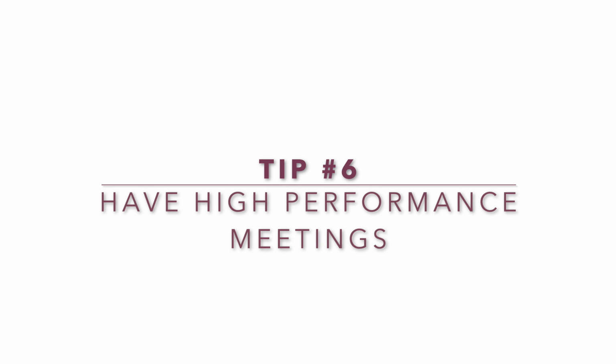And so another key to being successful in the role of a project manager is having high performance meetings. Now, what do I mean by that, right? You want to make sure that you have good meeting etiquette. And that starts off, one, with an agenda, right? You want to make sure that you define your objective for each meeting. You list out your topics and timestamp each topic. You want to make sure that for each topic, you also put what you want as a result of that conversation, whether it's to inform somebody of something, have a decision made, etc., right?